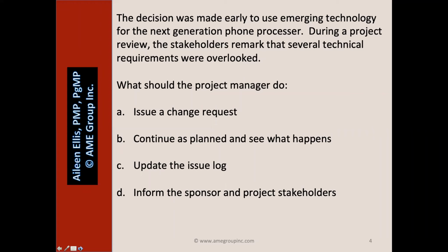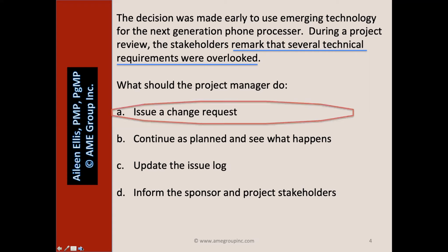Again, I ask myself, what are the key words or phrases? Several technical requirements were overlooked. So what do we do when we overlook technical or business requirements? We issue a change request because we need to get these requirements added to the requirements documentation, the requirements traceability matrix, and then we may need to update much of our planning.